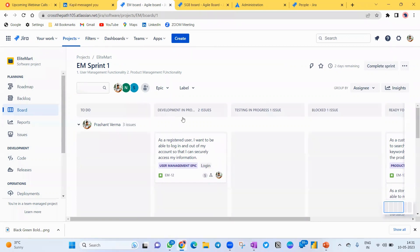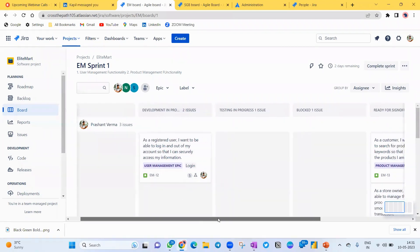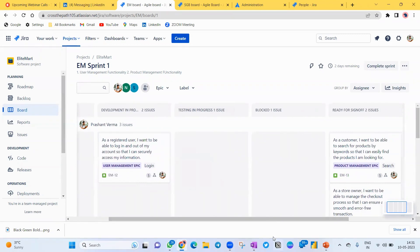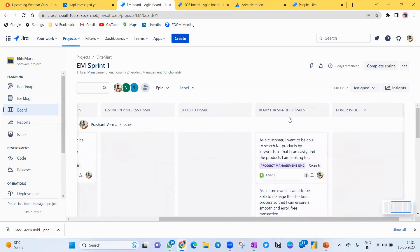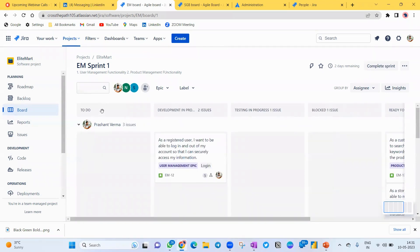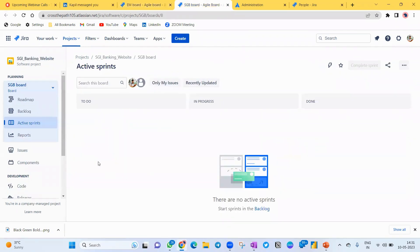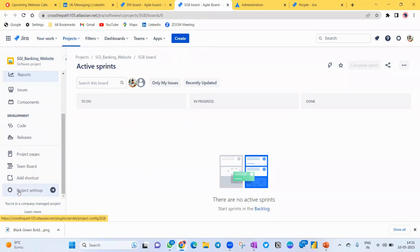For example, on my project 'Allied Mode Website', I want one more column: Development In Progress, so I can move stories there when development has started. Similarly, I want a Testing In Progress column, a Blocked column, a Ready for Sign-Off column so I can get sign-off from the product owner or stakeholder, and a Done column. Jira doesn't provide these by default, so let's configure them. Go to Project Settings.